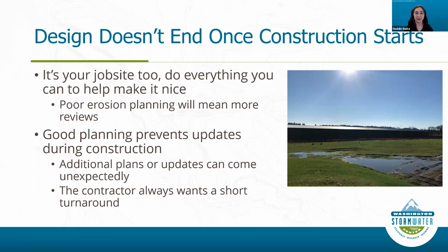And if you have good planning, it also prevents updates during construction. If additional changes are needed, these plans can come unexpectedly. And if construction has already started and the contractor needs some additional engineering or additional plans, they always want a short turnaround because they've already started work and they're all waiting on you. So it's nice to do this preemptive planning so that you don't have to do this frantic scramble during construction.